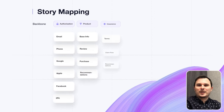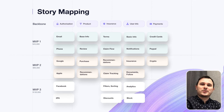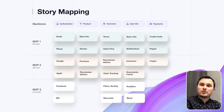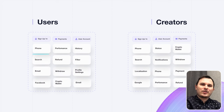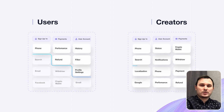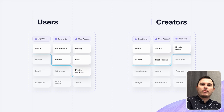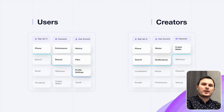That's where a story map comes into play. With a well-crafted story map, you can break down user requirements and map out the essential features that need to be developed and launched quickly. To ensure maximum user engagement and satisfaction, it's important to develop separate story maps for each user type — think of it as providing each user group with their own treasure map, guiding them directly to the features most important to them. Your MVP will meet their crucial needs and provide the best possible value. The real power of a story map lies in its capacity to help you save funds while enabling you to concentrate on providing the most value to your audience at the right stage.